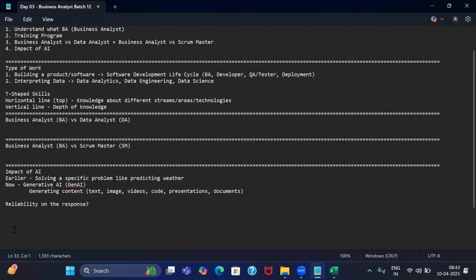Once you have taken notes, you might go through those notes, analyze them, and come up with more questions, maybe for the next meeting. Or if you are 100% okay, you try to convert your notes into a requirement document. Use that requirement document to again review with your stakeholders. Once they are okay, you pass on that requirement document to your team so that they can also start with their work.